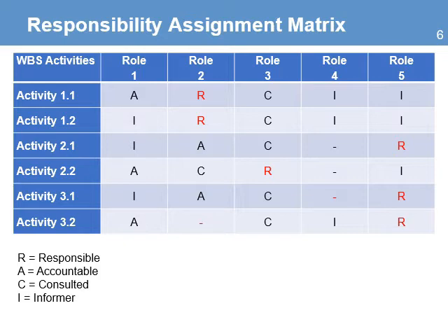The next role is for those that need to be consulted or contribute with information and experience to an activity. The last role is for all those who must be informed on the progress of the work and any issues related to the activity. Not everybody needs to be in every role. As you can see in the chart, there are some activities where not all the people need to be involved. The matrix helps ensure that all the team members understand their roles and responsibilities in the project, which helps reduce conflicts and duplication of efforts.